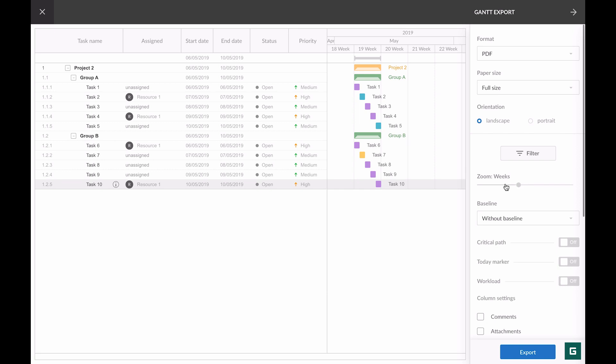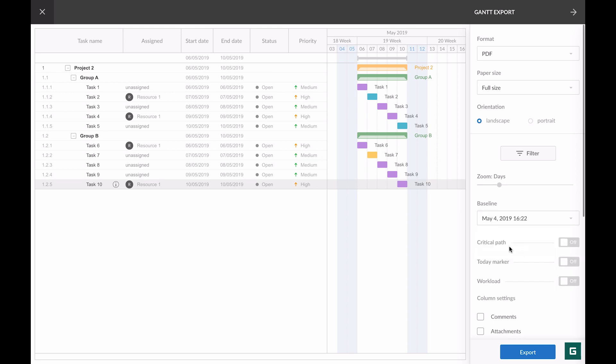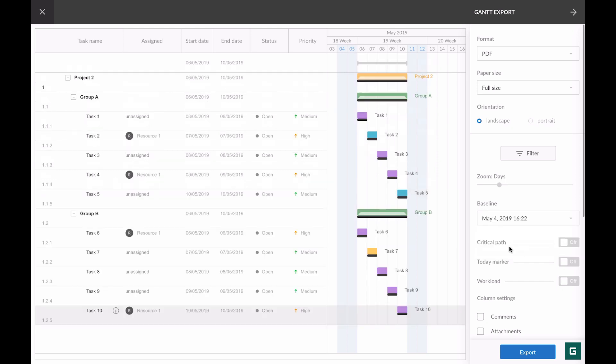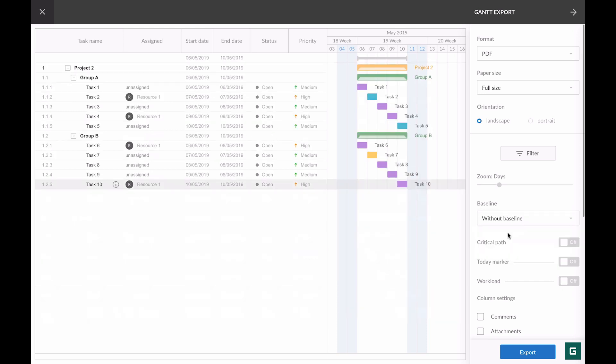If you have created a baseline before and you need to export your project with it, just choose the one you need from this field. Then go toggles. Critical path and today marker are synchronized with the project settings. If they are on in the settings, by default they are on here as well. You can turn them off in case you don't need them right from these settings.